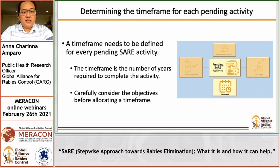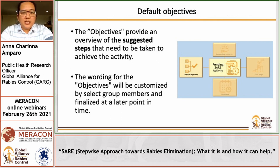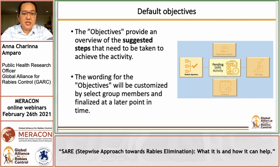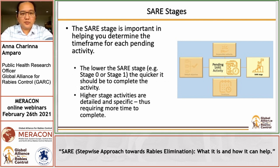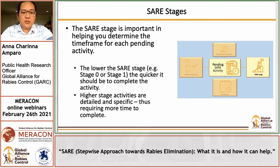The timeframe also needs to be set for each activity — this is the number of years needed to complete the activity. Looking at the objectives will help you decide on the appropriate timeframe. In the tool, we have default objectives that are automatically populated for each activity, providing an overview of the suggested steps that need to be taken. They can be customized depending on the country's needs. The SARA stage is important in helping you determine the timeframe — the lower the SARA stage, the quicker it should be to complete the activity. Higher stage activities are detailed and specific, thus requiring more time to complete.